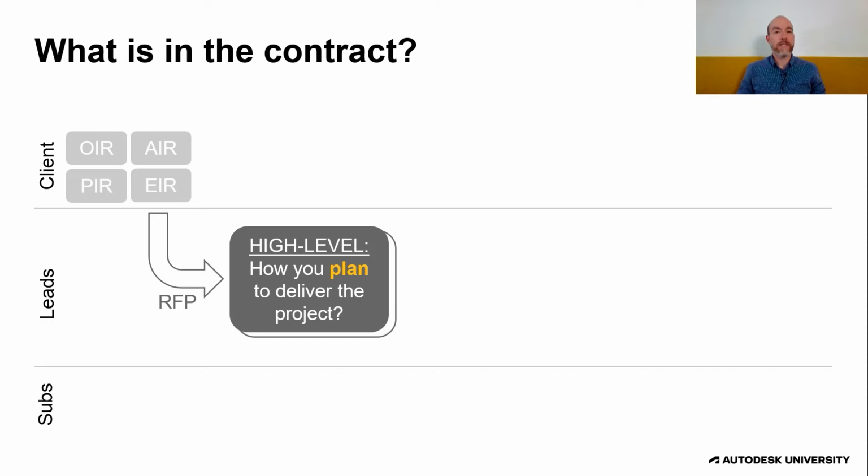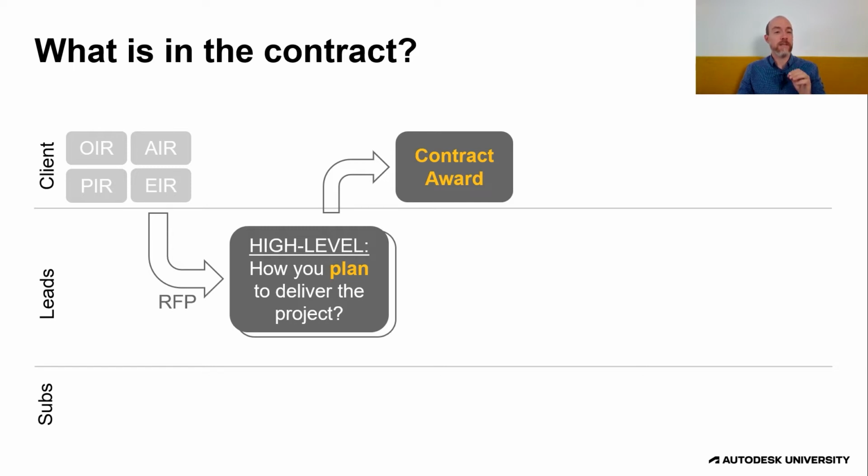There's another key step to this, which is that those groups bidding on the job provide high-level delivery plans that tell you how they're going to deliver against those requirements and which steps they are and are not going to do. That information allows clients to evaluate all the different bids and compare them apples to apples. Is this group over here using a database system for collecting the information so that it's much more efficiently collected and validated? Or are they just going to be exporting stuff out and manually filling it in spreadsheets? This is the sort of thing that you need to know up front.